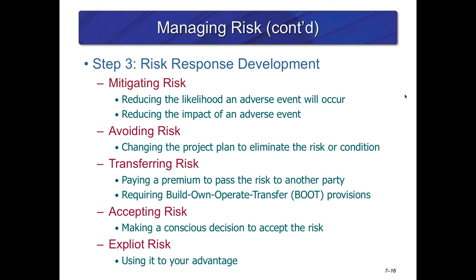I don't know, like gathering supplies beforehand, maybe? Right, so you gather your supplies beforehand. What else do you do? What else do you do to your house before the hurricane gets there? Put shutters up on the windows. Put up the shutters, right? So all of those reduce the impact of the adverse event. It does not reduce the probability that it's going to occur, but it does reduce the impact.